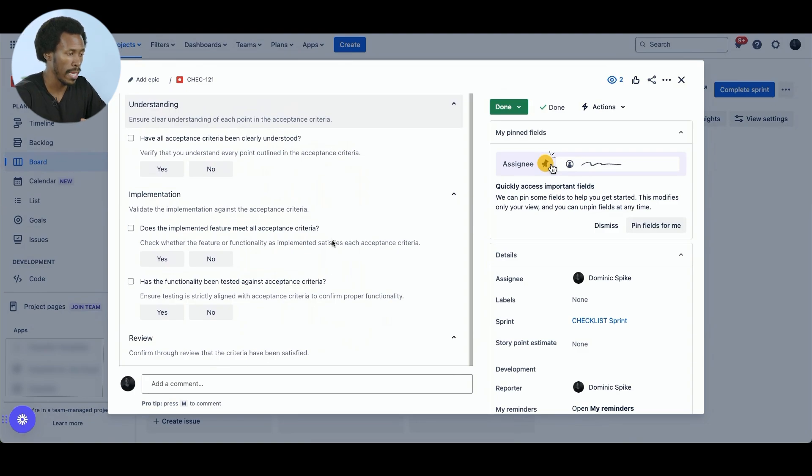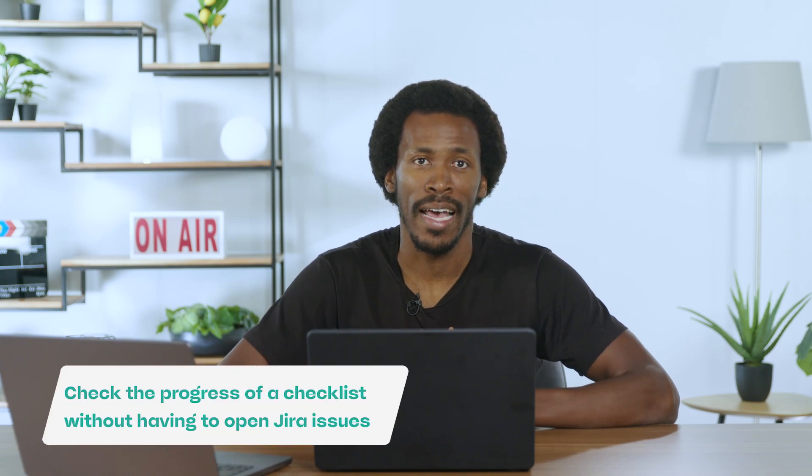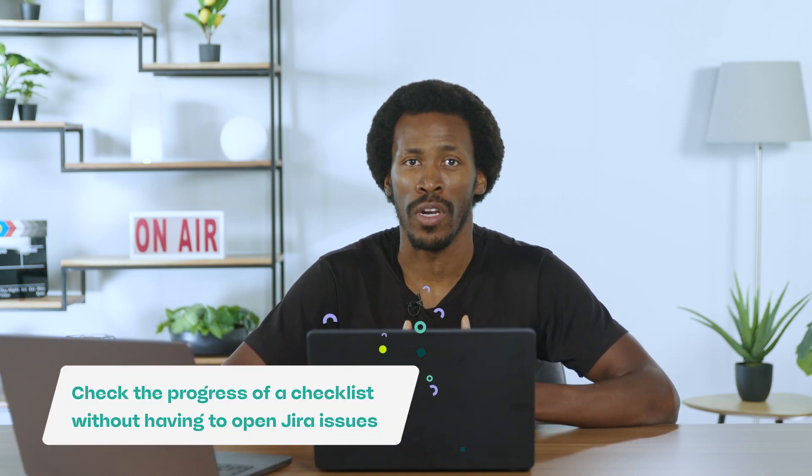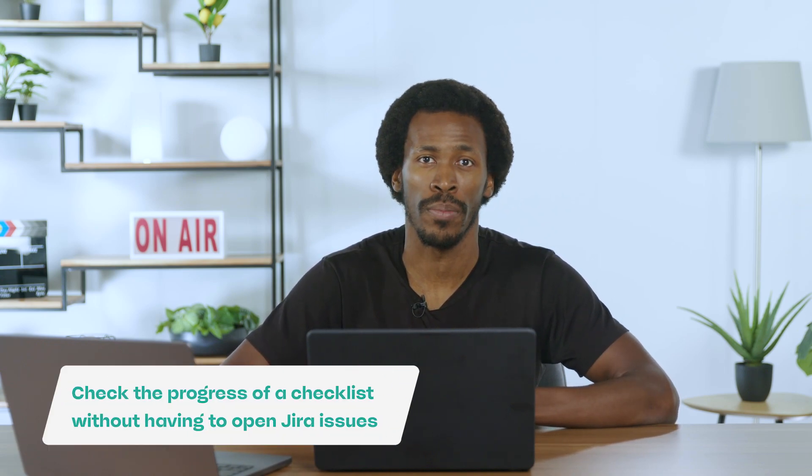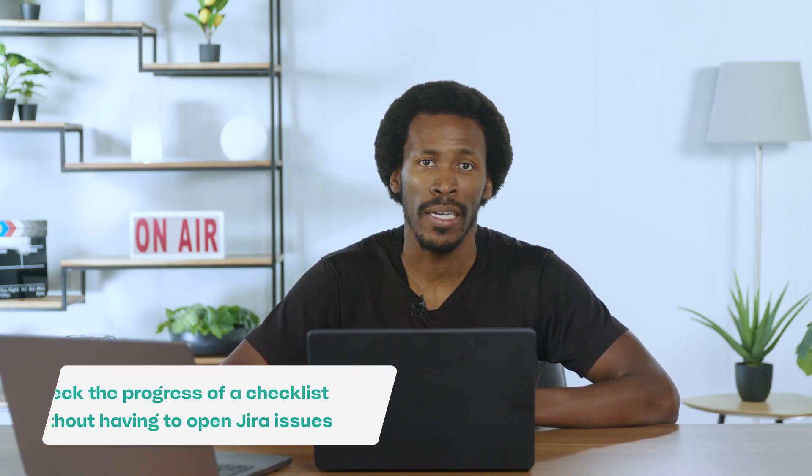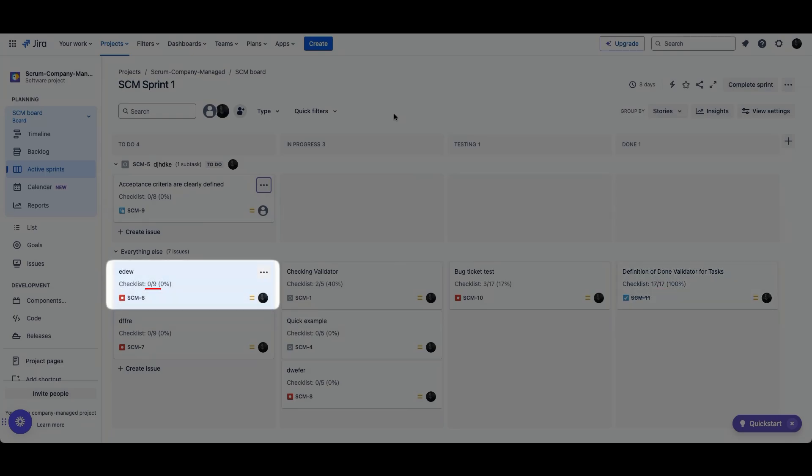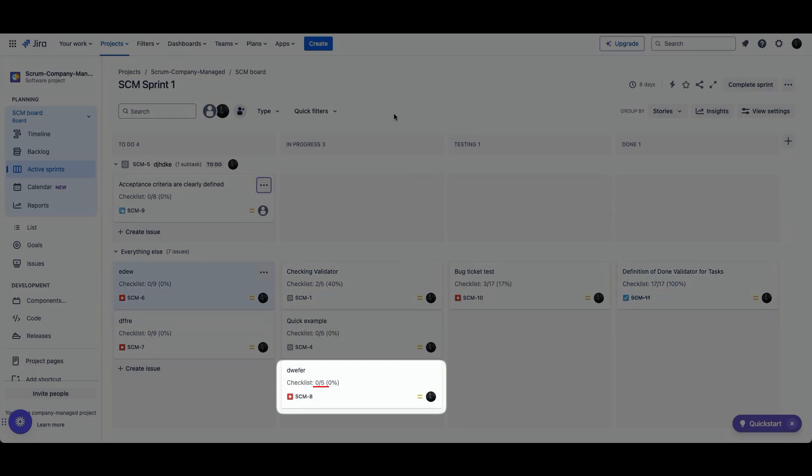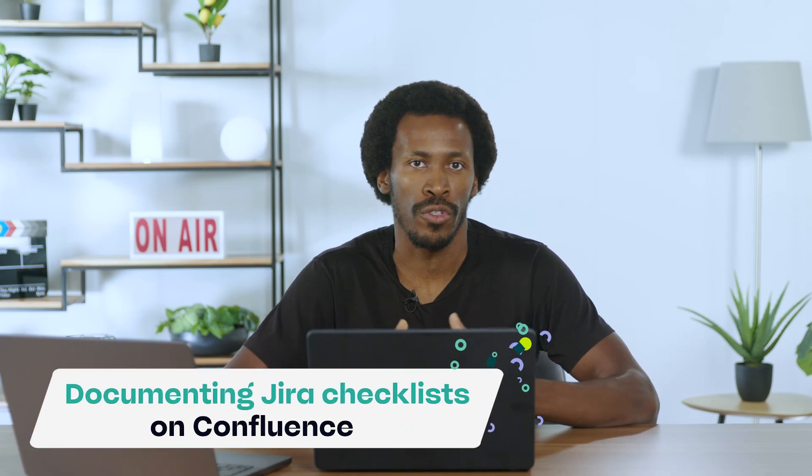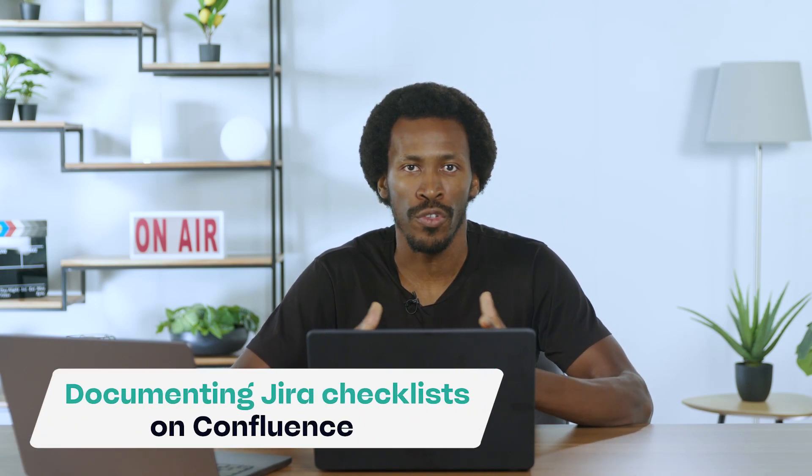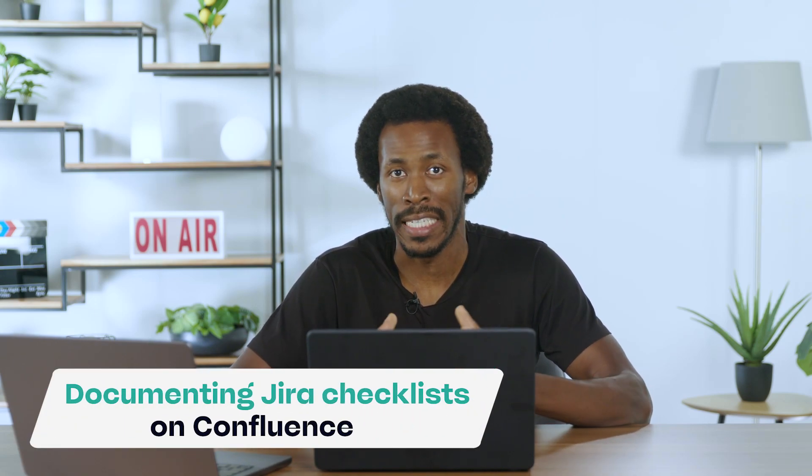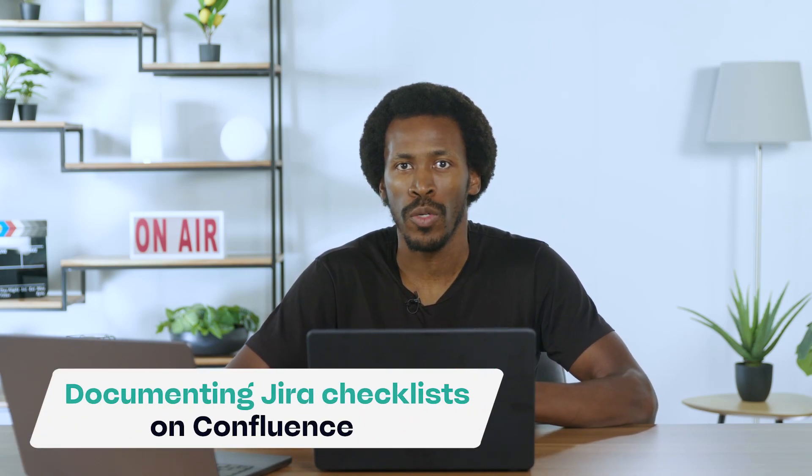Opening issues one at a time is inefficient and a pain when I just want to know how my user stories are progressing. I would prefer to see it at one quick glance. A checklist custom field configuration in the JIRA board is all it takes. My team and I will be able to see the percentage of acceptance criteria confirmed from the board view. Considering all your acceptance criteria have been satisfied for your user story and the new version has been released, you probably want to document this somewhere for compliance reasons. I personally prefer to use Confluence for this.